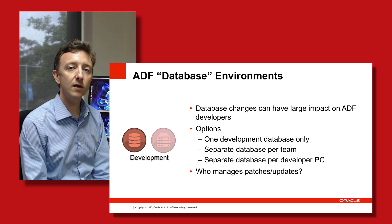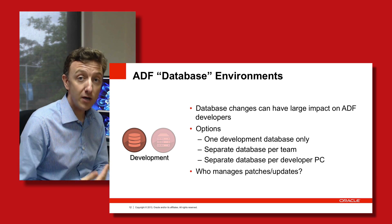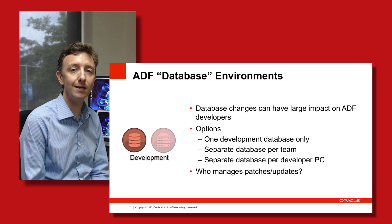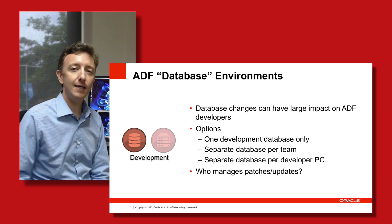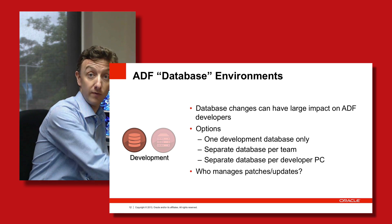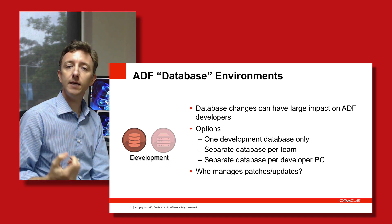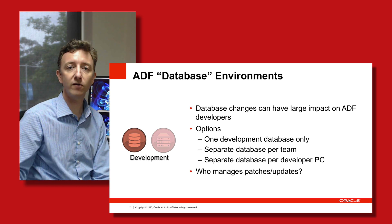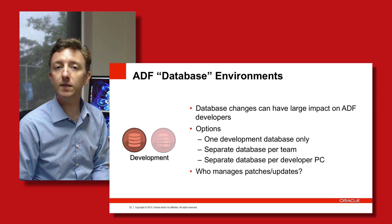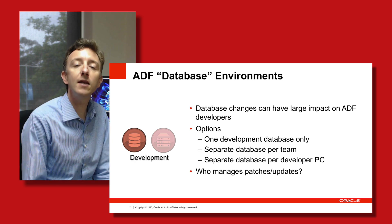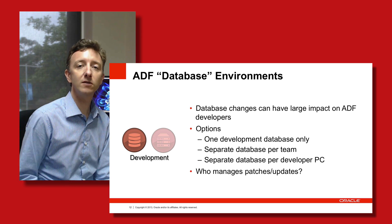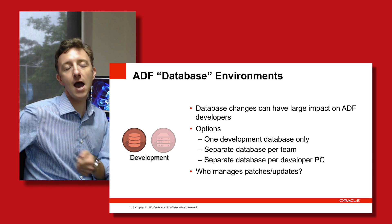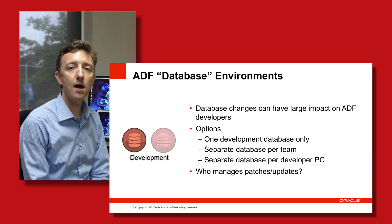But at many sites the database has been around for a long time and there are other systems integrating into it, so ADF developers building on top of the database may not know about all the changes happening underneath them. Somebody could be changing PL/SQL packages, dropping tables, rearranging or renaming columns — all of which will impact your ADF developers. When developers have their head down coding to spec, you may not want that instability underneath them. So you need to consider whether each ADF development team should have a stable, dedicated development database or one that is shared.